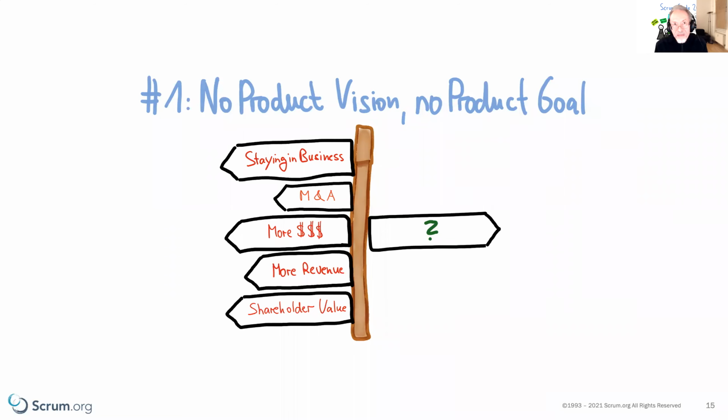And I would even say that it's beneficial to come back to items. I've always been supportive of the idea that we come back to a product backlog item two or three times to actually complete the refinement. We talk about something until we run into an issue, a question that needs to be answered before we can continue. Then we continue with another product backlog item and come back to that one when the question is answered. So refinement in my eyes is a flow of consecutive refinement steps until we come to the desired outcome. Great, thanks, Stefan.